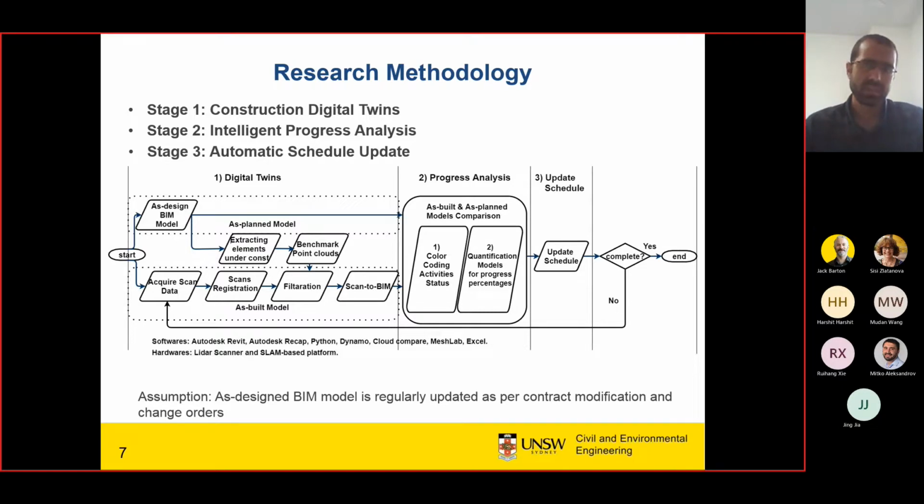The percentage we get from this second stage is then used later in schedule updates in different software, for example Primavera or MS Project. If we have only one cycle of work, it finishes there. Otherwise, the same loop is used continually until the end of the project.